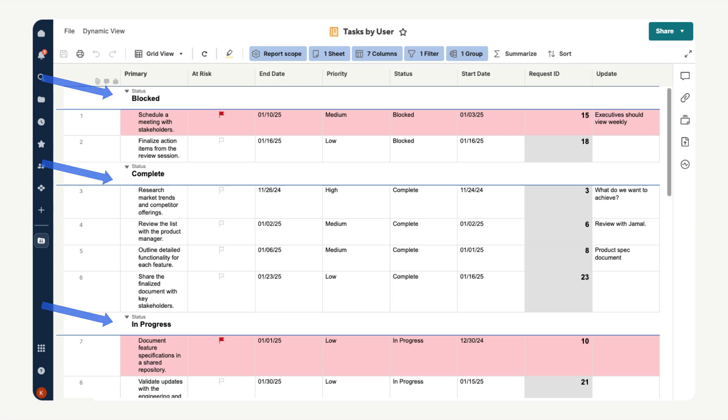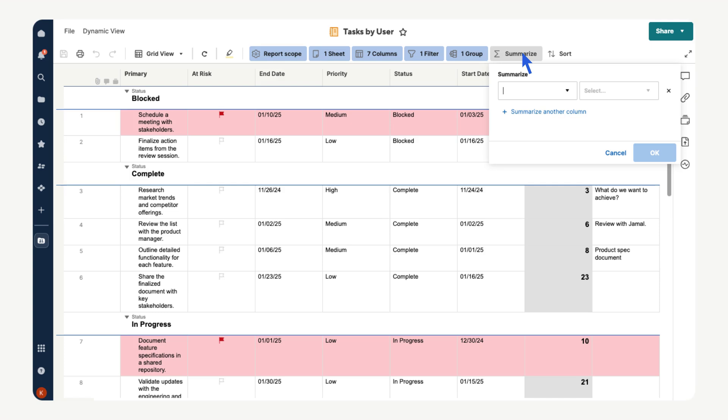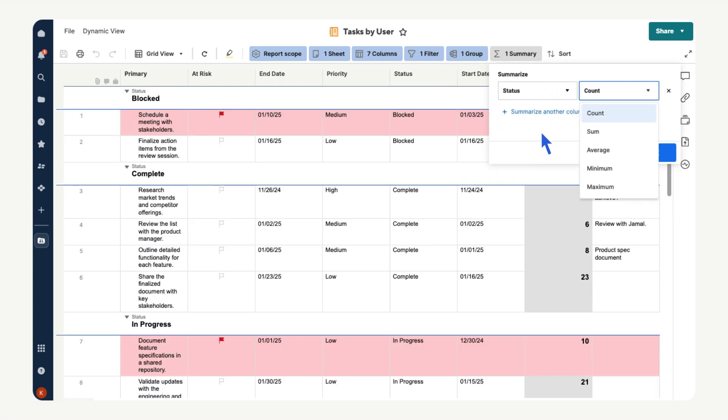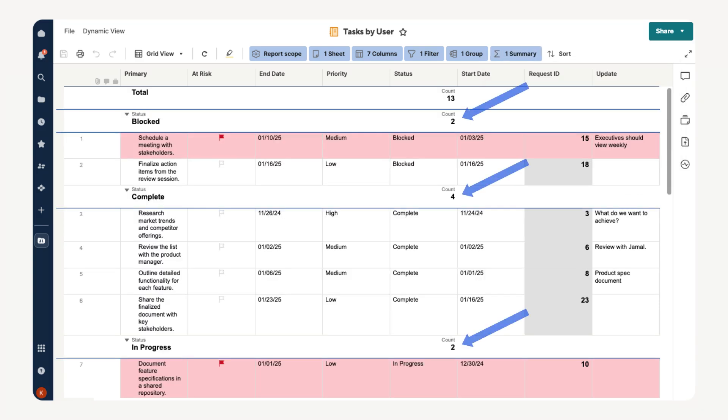Another helpful feature is the summarize tool. We can use that to count, sum or average various data in our report. Let's get count of how many tasks are in each group. Select summarize, open the drop down menu and select status, then in the next drop down menu select count. Finally, choose ok. Now you can quickly see how many tasks fall into each group.